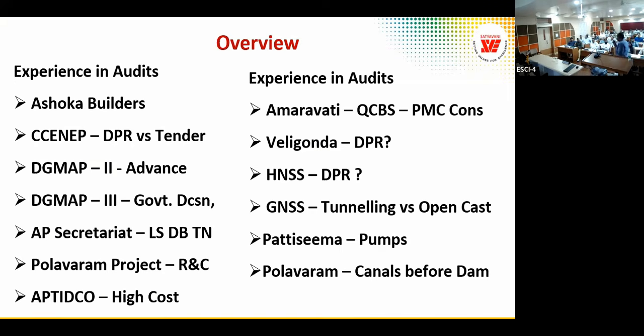So in my next project, that CCNEP, you know what I did? I mentioned mobilization advance only upon mobilization, 50%. Upon commissioning and commencement, 50%. That's all. Only when I certified that this machinery is there, we pay mobilization advance, because the contractor is mobilizing his assets to our site. So we have to pay. But without mobilizing, if you pay, and if he doesn't mobilize, what is the way to recover? Only bank guarantee.